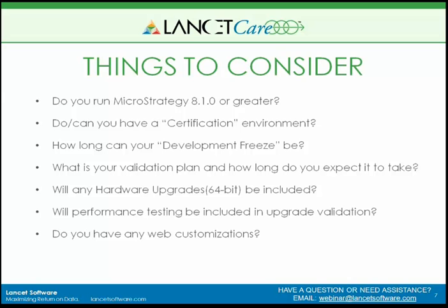So a couple things to consider as you're planning the upgrade and planning your project plan for the upgrade. First thing is, what version of MicroStrategy are you currently on? The upgrade process requires that you upgrade from a minimum of MicroStrategy 8.10. So if you're on an older version, you actually need to upgrade your metadata to 8.10 and then upgrade to version 9. So if you're on an older version of MicroStrategy, just consider that's an extra step in your upgrade. It may take a little extra time.